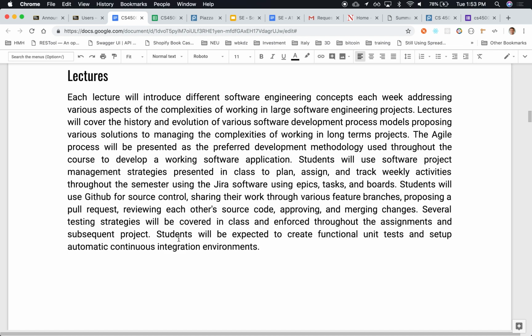So we'll give you as much as we can in examples and tons that you can build on. Your focus will be: okay, I'll have to plan out the fact that I don't know this, and I have to plan at least perhaps 4 hours learning my way around JPA or MySQL or whatever. That will be part of your plan for that week, for that particular sprint. Learning that skill, or how to use Jest for testing, or JUnit, or whatever it is. You have to plan your week. The planning part is what we're going to be grading or evaluating you on, because that is the topic of this course. Yes, you'll have challenges. How are you addressing these challenges?